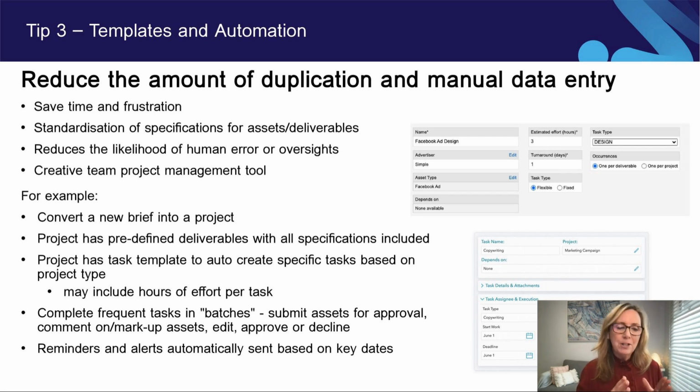And they know that every time they do a tier 1 project, there are these deliverables and these tasks that are included in it. So if that's the same pretty much every time we do it, let's set up a template that says, oh, it's a tier 1 project, great. Here's all of the tasks. Here's how long it takes, and I don't have to manually go in and set those up every single time.